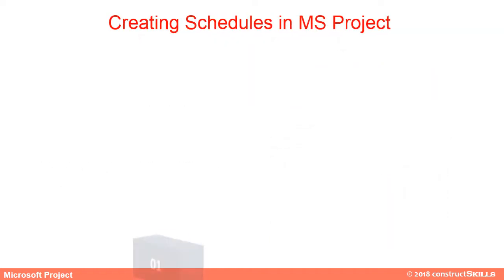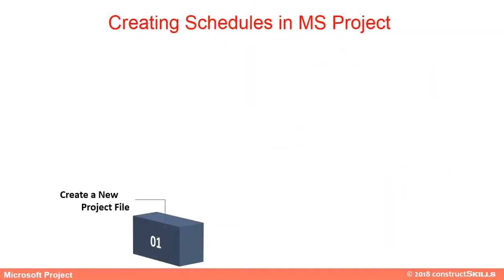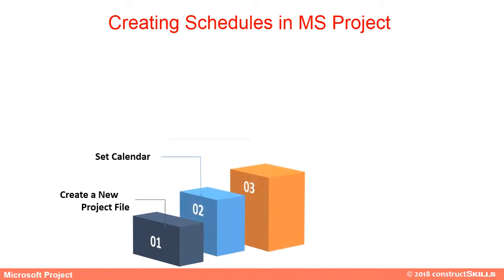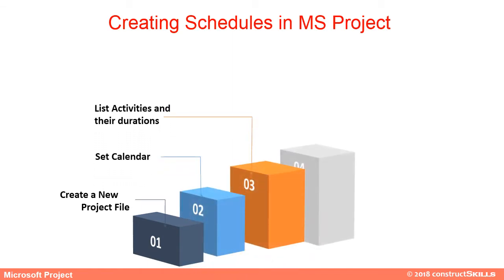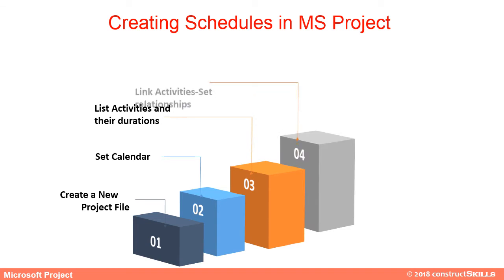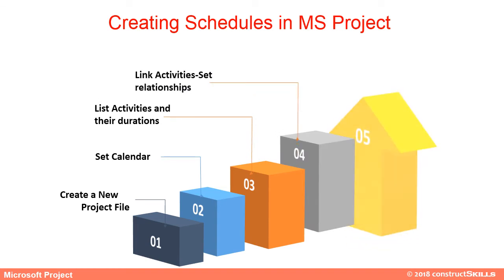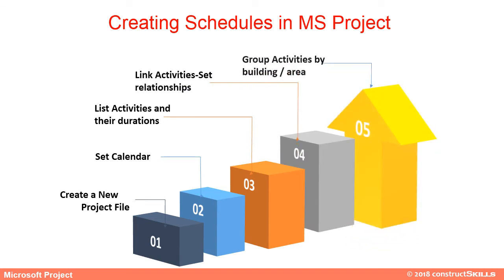The basic steps involved in creating a first schedule are: creating a new project file, setting the calendar, listing all the activities and their durations, linking activities, and grouping relationships as per assigned relationships.